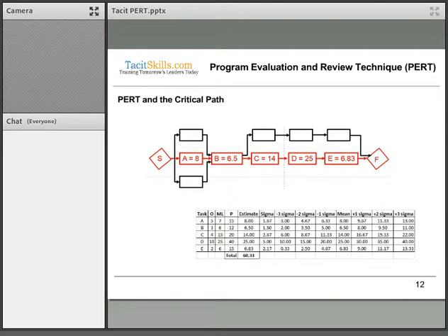But that also means there is uncertainty, and we might be over or under on the different ones. If we look at A, as we said just now, we calculated sigma as 1.67. That means if we look at 3 sigma, and the minus 2 and minus 1, the minus 3 sigma was 3, or 2.99 just now, rounded up, to the other end at 13, and then the 2 sigma between 4.67 and 11.33.